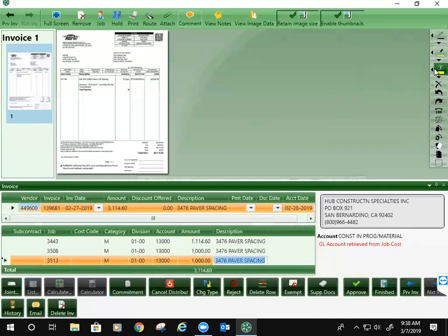Yeah. So our invoice is going to be the 3,114. We're going to send that off to you. If you get there and say, I'm not paying that $1,000, and you change the invoice amount, now the PDF will be off. That's the value of the comments and the text box to say, I deleted $1,000 for whatever reason. It should match when it gets to us. It will match when it gets to you.